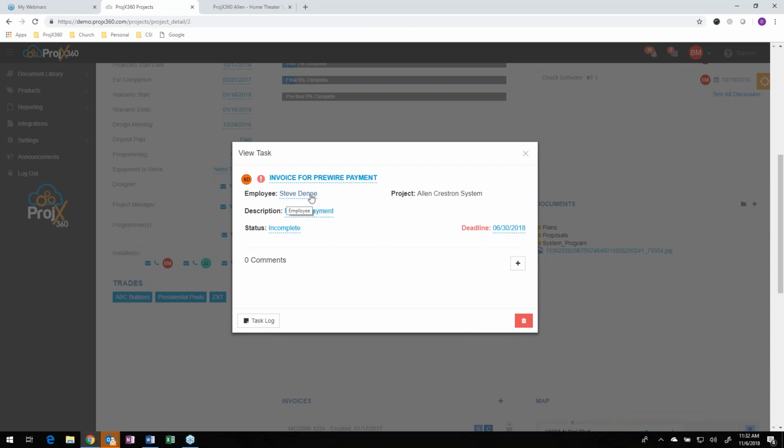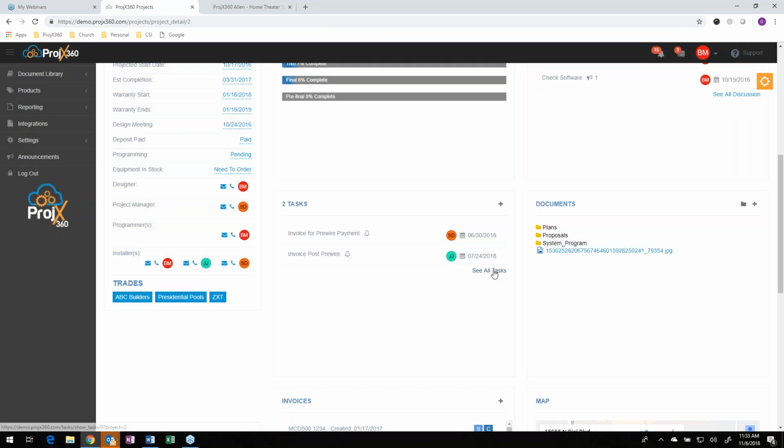We did that on purpose, because if you allow multiple people to be assigned to a task, who knows who's accountable for it? If I assign Steve Denny and Doug Greenwald to one task, Steve's going to think Doug's going to do it, and Doug thinks Steve's going to do it. We get asked this question a lot. That's not what a task is designed for. A task is done specifically for an individual. You'll give it a description, and you'll set a due date. They'll get a notification that a new task was created, and then also in the notifications, you can set it up so that you get notified anytime the status changes of any one of your tasks.